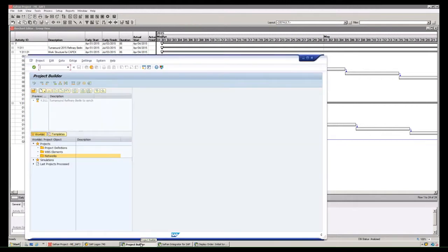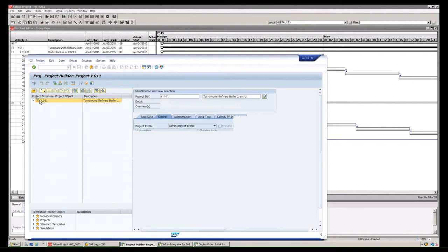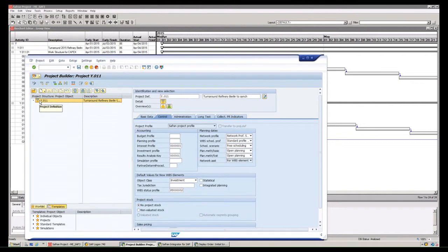And as an outcome of this, there would be an SAP and approval workflow where the rudimentary shell of a project, of a CapEx project, would be created, which I have prepared here, probably with a few WBS to structure it out first. Then you put your basic budget on the project, but no details in it. It's just the rudimentary project shell which we want to work with. So this is on the SAP side, the outcome of the workflow of an approval.